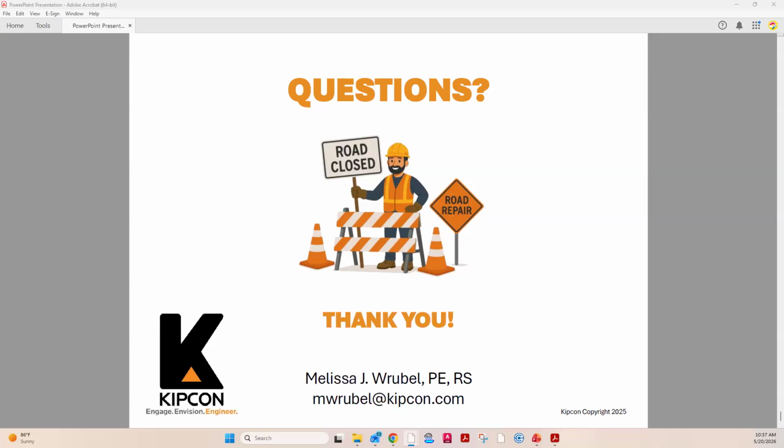They are oftentimes contractors we have done multiple projects with successfully. So in terms of vetting the contractors, although we ask for references from those contractors, they're more for the benefit of the owner than for us. We are very familiar with the projects that they do and what their quality of work is. So that's our vetting process, is that we have done multiple projects with them.